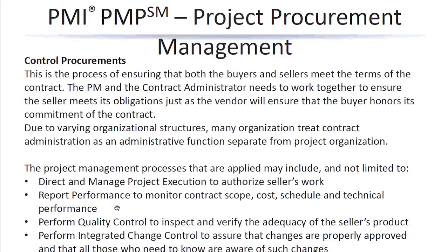Then report performance to monitor contract scope, cost, schedule, and technical performance. So the seller will report the performance, and as a buyer you have to monitor contract scope, cost, schedule, and technical performance. See that it is meeting all the milestones, it is meeting all the quality requirements, it is meeting all the cost and schedule requirements. And it is of course working on the risks that were identified and communicated to us.